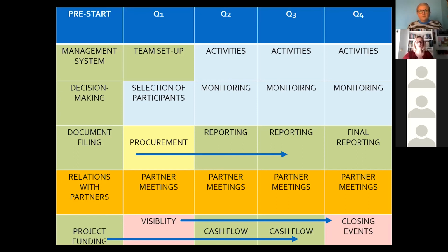That means after the 12 months, you are preparing some progress report. And then the donor is reviewing that report. And then the donor is saying, oh, I have additional questions, or please submit additional documentation. And that is eating our time. And we are nervous because we are waiting for another portion of the funds to continue with activities. Very often we get stuck with the implementation if we did not ensure funds and did not count on ensuring the cash flow in that process.